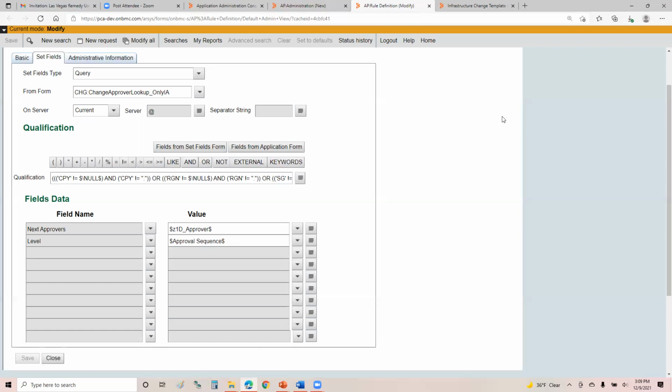Well, hopefully you've sat down and done your business process as to what's classified as standard, normal, and expedited. Keeping in mind, expedited has already been done. Emergency goes through a different process, but it's mainly the normal that you're focusing on that goes to a CAB. The standard is, have you ever done this before? If you haven't done it before and you're putting it in as a change, go to the CAB. Not expedited, go to the CAB.